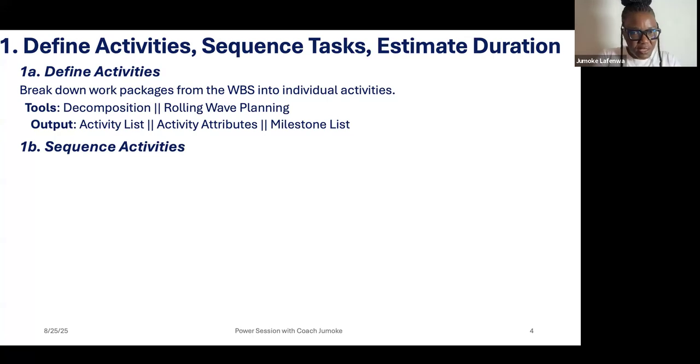You have to first mix the concrete in the right proportion. You will not say you are laying blocks when you have not made the foundation and allowed it to dry in the number of required days before you start laying blocks. You cannot start painting when you have not completed plastering.